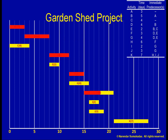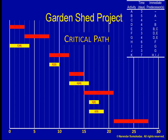Now, I am going to mark some of the activities in red and call this string of activities the critical path. Do you notice anything special about these activities? For one thing, these activities stretch in a contiguous line from the beginning to the end of the project. What happens if we delay one of these activities, say F? Instead of finishing on day 15, what if it finishes only by day 16? H is dependent on F, so it will be pushed out one day, and the entire project is going to be delayed by one day because F was delayed by one day. Thus, the critical activities appear to form the backbone of the project — if this string of activities is stretched, the entire project will be stretched.